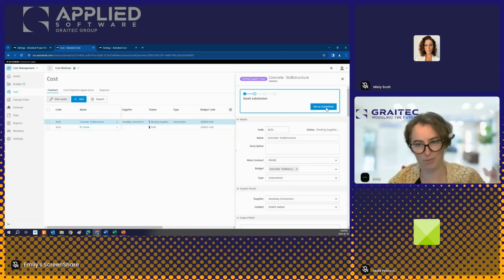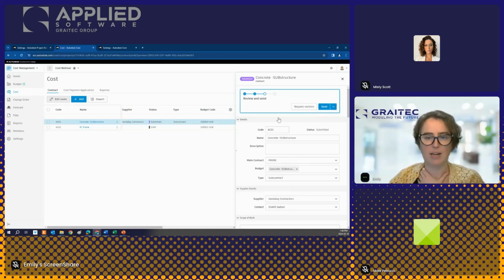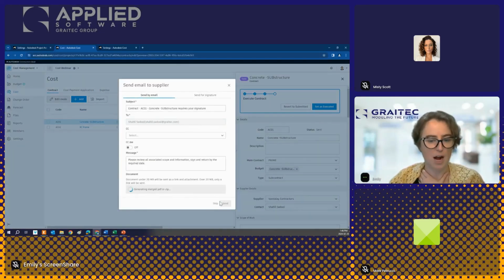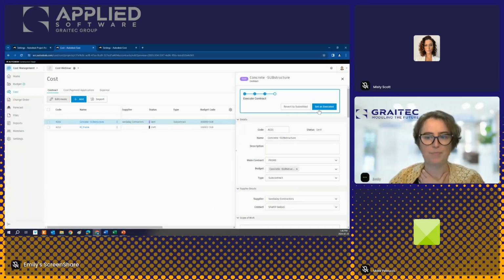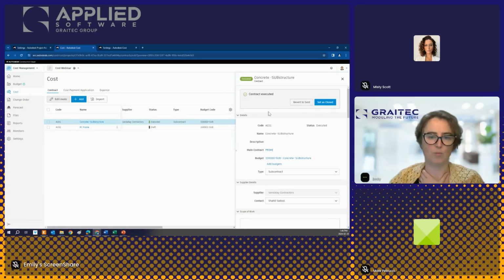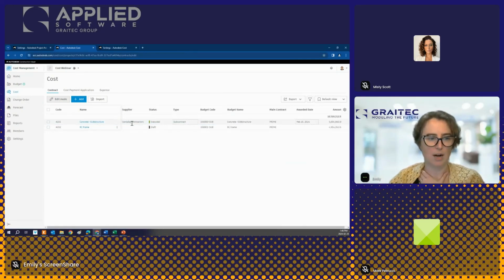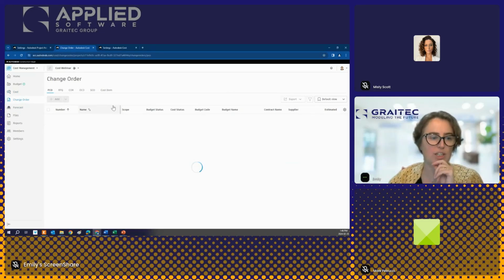My subcontractor, having uploaded all of that information, will be able to submit this back to us. I'm acting as both, so they have technically added those. I'm going to set as submitted, and we're going to send this off for official signatures and set as executed when they come back signed. So I now have a contract in here, and we can take a look at our change orders from both sides of things.